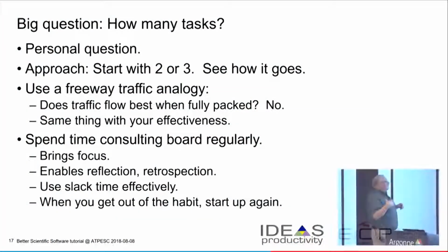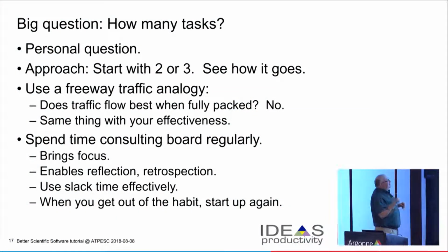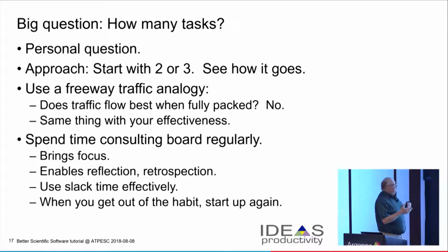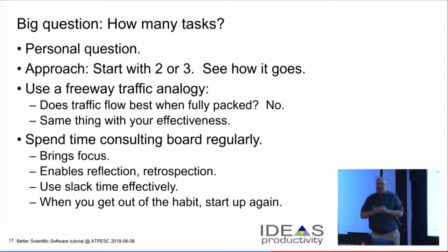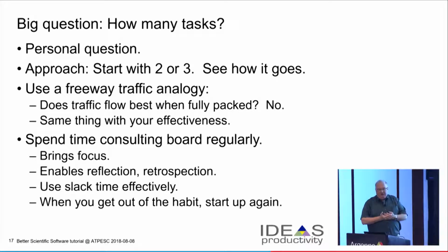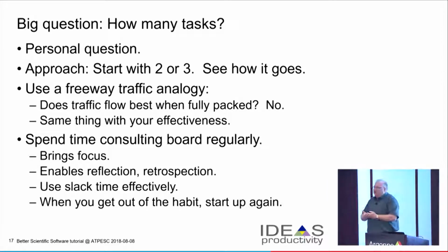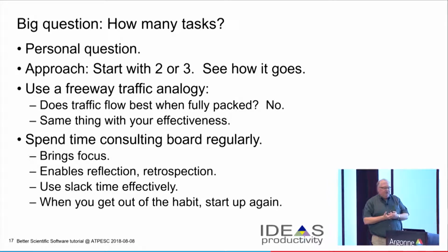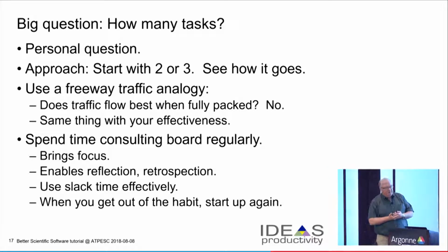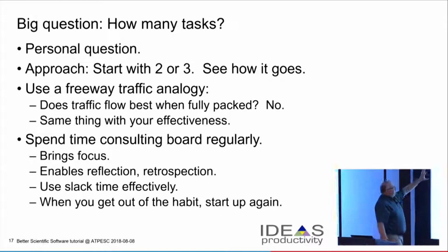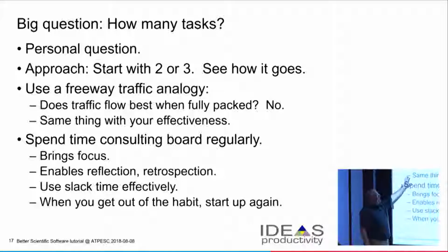So the big question here is managing this work in progress. How many tasks should you be doing as a person and as a project, right? This can be very individual, and it's something that you have to do some experimentation with. Oftentimes, the advice is to start with two or three and see how it goes. Sometimes people can handle more. Sometimes people can only handle one thing at a time. It depends on the individual.